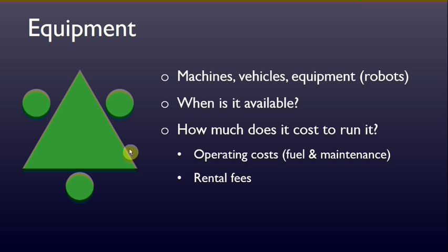not only do you have a per hour fuel cost that it takes to just run the engine, so whatever the going rate is for diesel fuel, times the fuel efficiency of that vehicle, but then also over time, every 1 month or so, they might have to bring it down out of rotation, and they have to do some maintenance on it, and then there's costs associated with that as far as paying the mechanics to do that maintenance, for parts, lubricants like oil or whatever the case may be that they would incur for that as well.